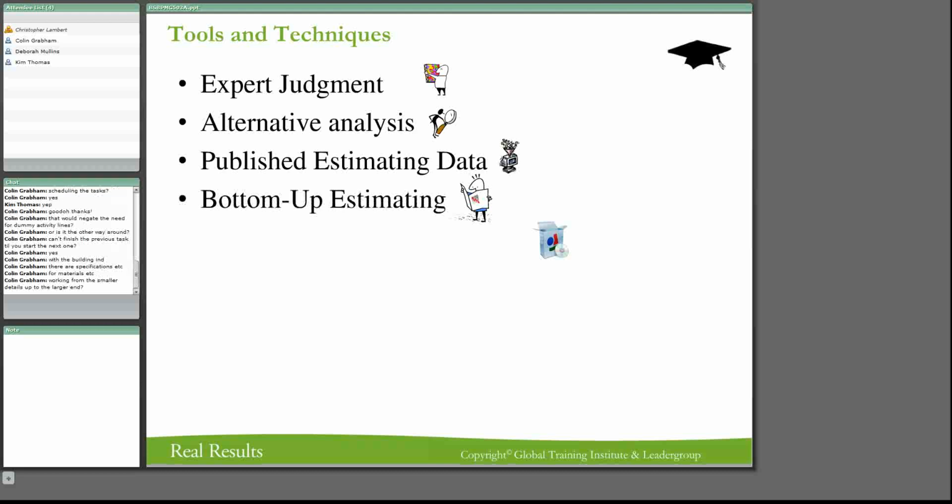But what happens is you've come to an activity as a team, and then you realize, hey, I can't get a decent estimate out of here. So what you're going to do now is break it down further, so that you can get more dependencies and a better idea of what that activity is going to be. Maybe you should have a lot of your activities already broken down, and this is saying, well, we can't really get a good estimate here. Let's break it down further, and then we use the bottom up until we've got a reasonable one. That's all that they mean by that one.